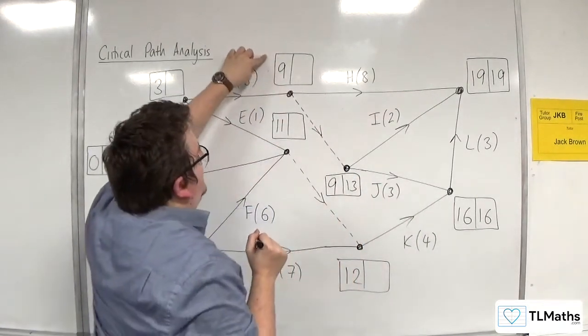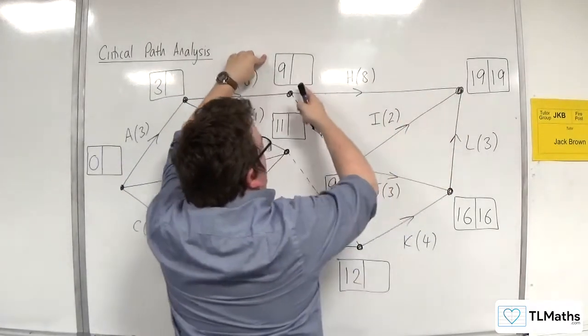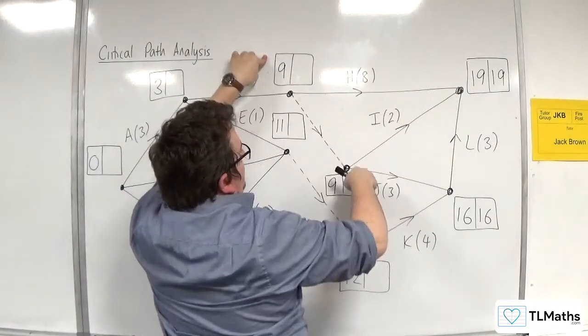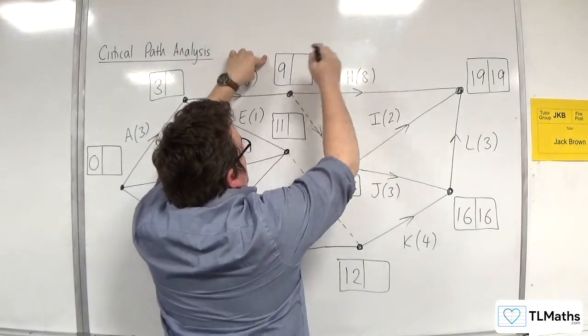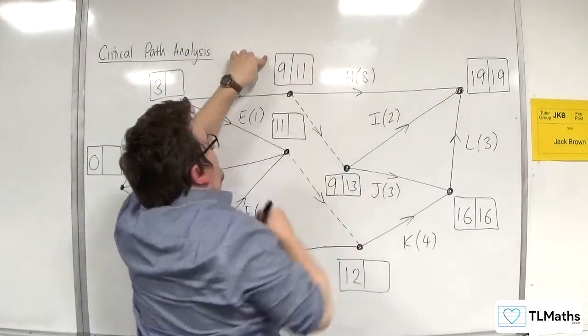Now for this box here, we've got 19 take away 8, so 11, or 13 take away 0. So we take the smaller, so 11.